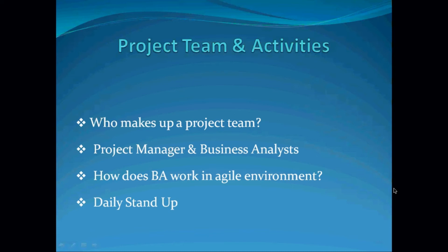If you see anywhere they're saying daily stand-up and the meeting is running to 45 minutes, it's no more a daily stand-up. Or one hour, it's no longer a daily stand-up. So that's on to the project team meeting, so you just need to be aware of it, because they may ask you a question, or maybe when you go for an interview, you may be saying some things as well, maybe on Agile. So you need to mention that you participated in the daily stand-up. But daily stand-up is usually 15 minutes.